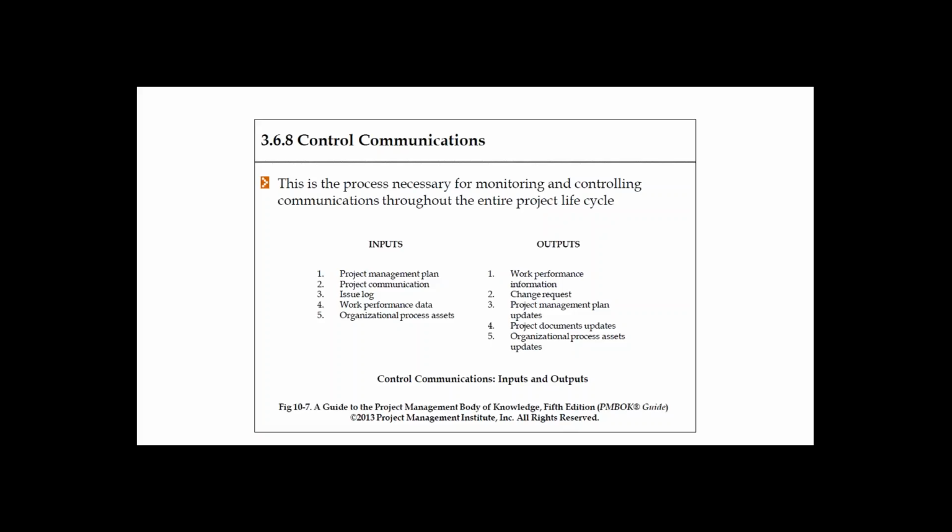But it might have been observed that other team members complained that these guys' scrum updates are disturbing our work. So then it has to be proposed as a change request that we have some issues, so the scrum updates or stand-up meeting should happen inside a closed room. They have to go to a conference room so that it does not disturb others. Then it requires updates to the project management plan, if everyone agrees that it can be inside a conference room.